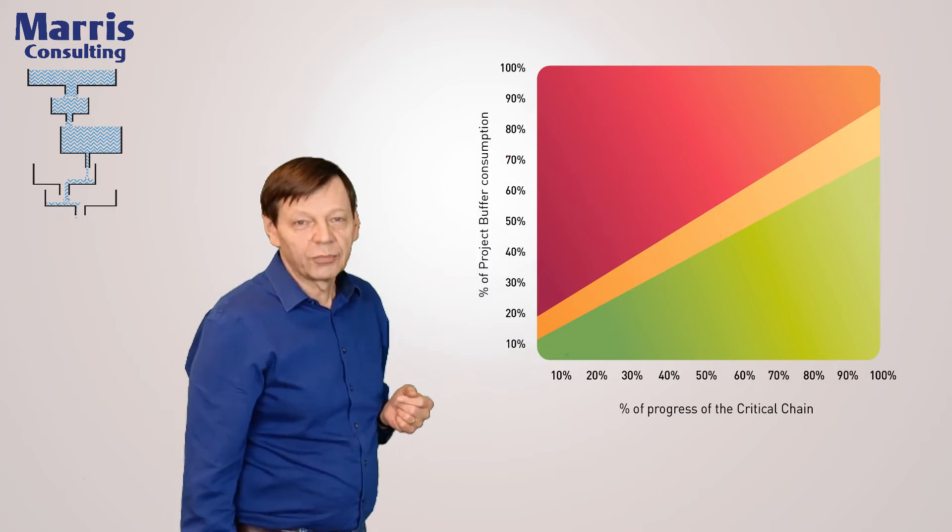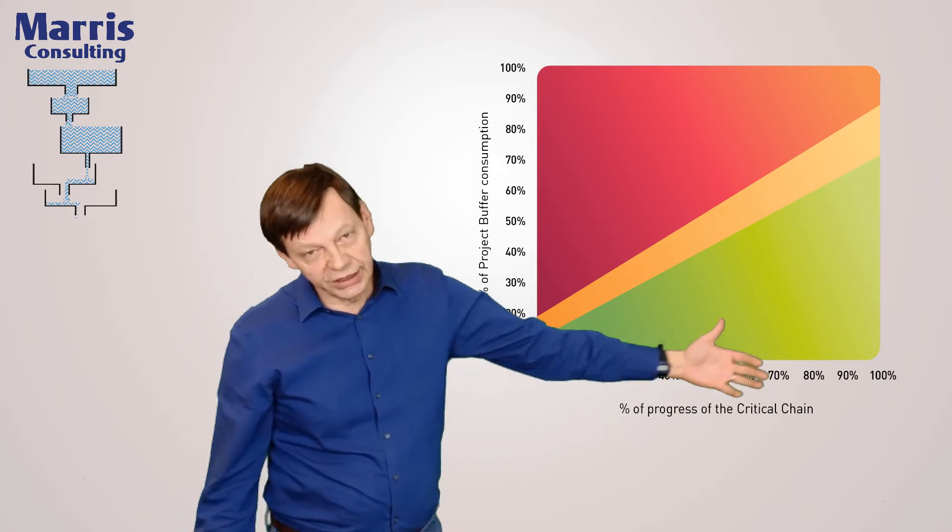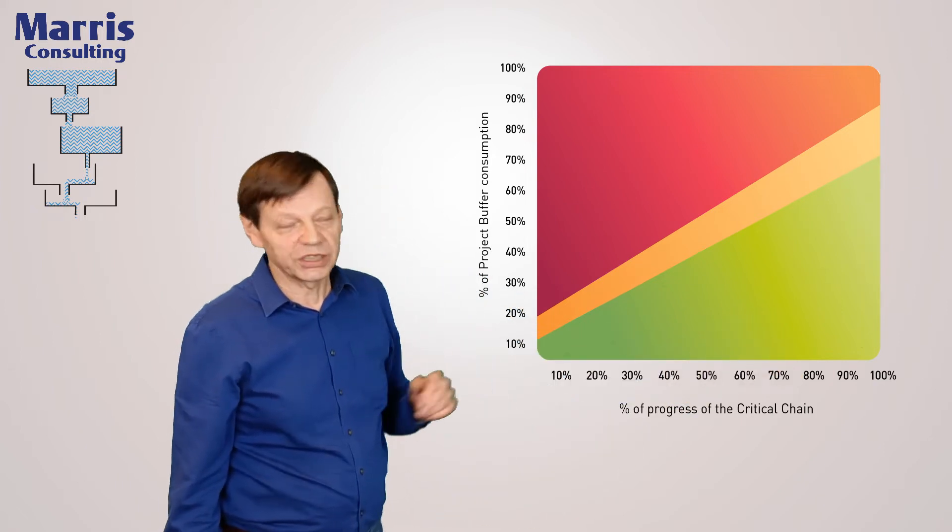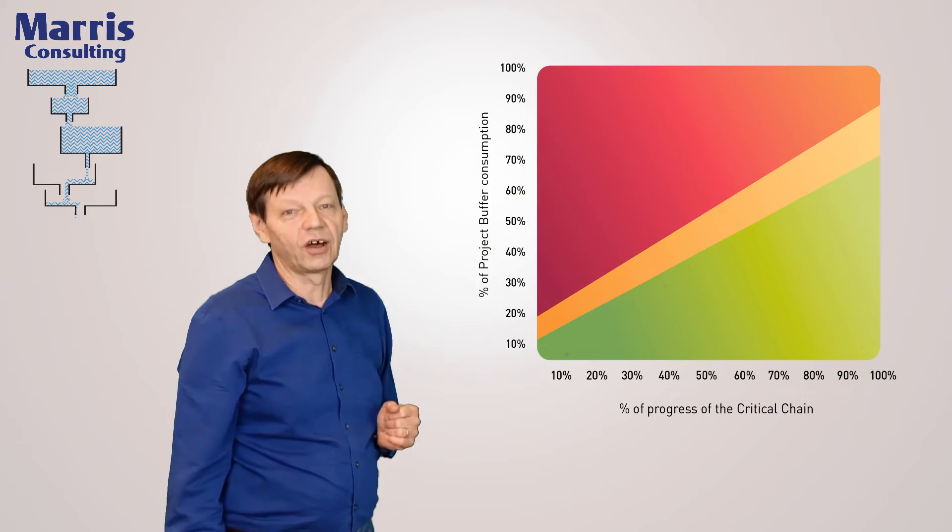So for instance in a product development you might have two years of focused or optimistic duration and a whole year of a buffer.